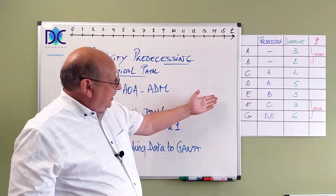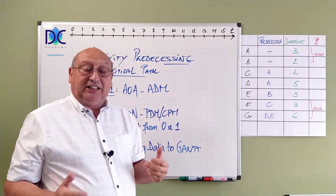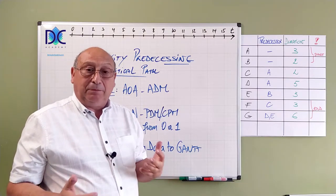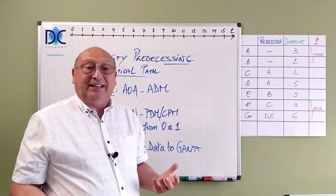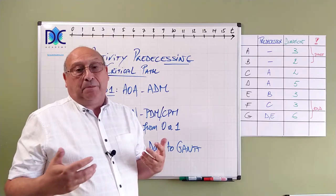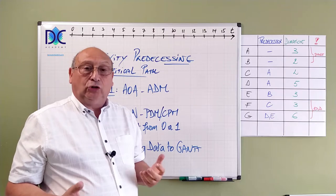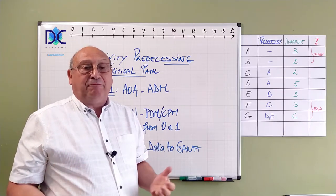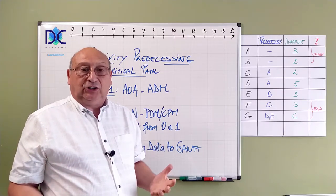The other element is F and G. Those activities have no more successor. It means that they are at the end of the project. Once those two activities have been completed, the project is finished.